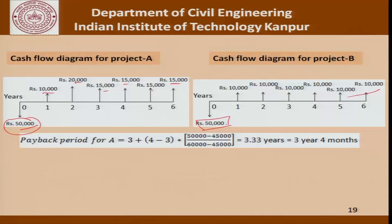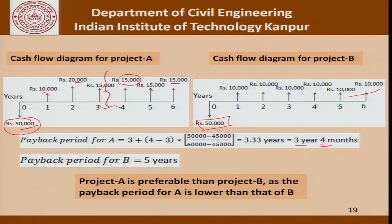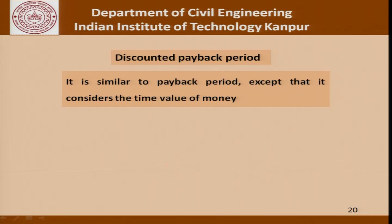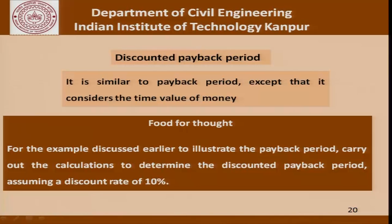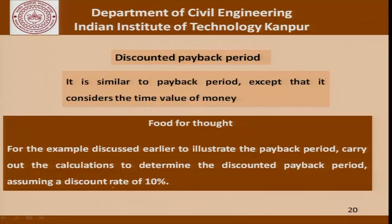The payback period for A is three years and four months: after three years the recovery is 10,000 + 20,000 + 15,000 = 45,000, and only 5,000 more is needed from the 15,000 of year four, which is one-third of that year — four months. For B the payback period is simply five years since recovery is 10,000 per year. Project A is preferable as its payback period is lower than B's. The discounted payback period is similar but considers time value of money — I leave it as an exercise at 10% discount rate.